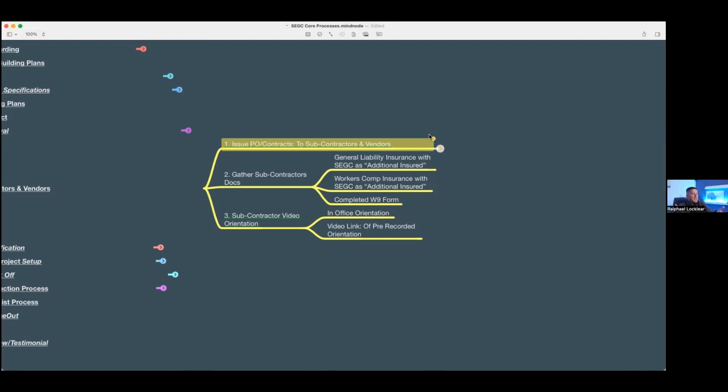Right? But that 30 minutes we spent on the job site, using our messenger group and having the subcontractors show us video proof and pull measurements, how quickly were we able to catch that? Hey, whoa, that's not right. That needs to go over what, 3 inches. Mhm. So you need to do this, this, and this. So go ahead and do that.